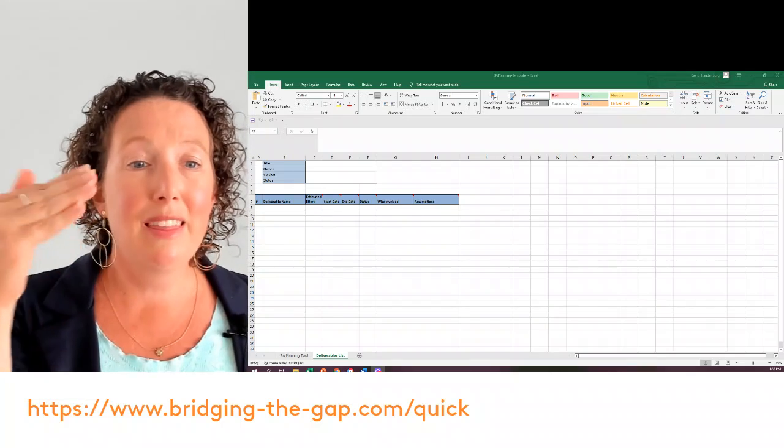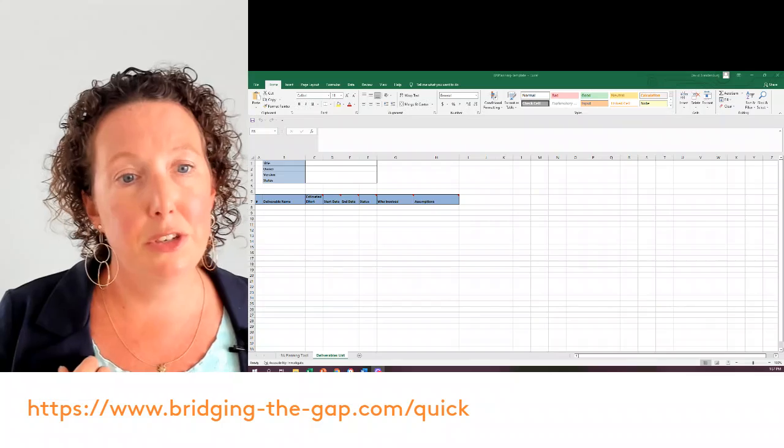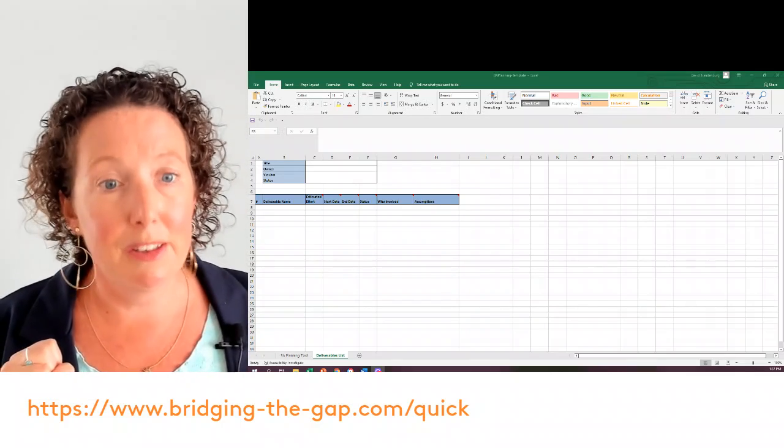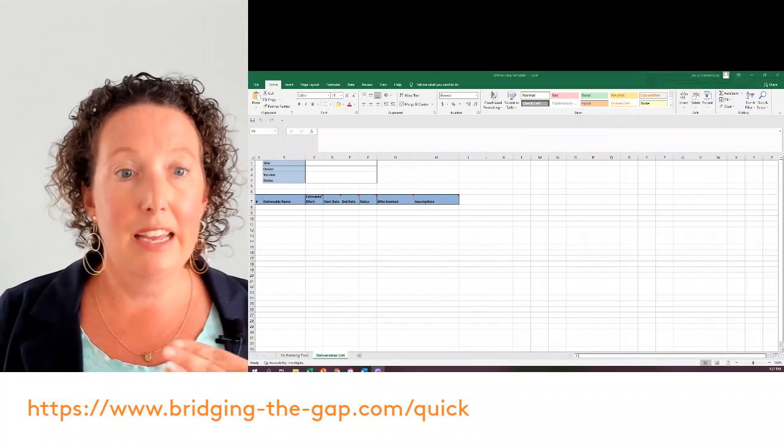Then you would estimate the effort that would go from you as the business analyst into that deliverable. So is that a 4-hour deliverable? Is that a 12-hour deliverable, right? You want to add that up. And then you look at the start date and the end date.